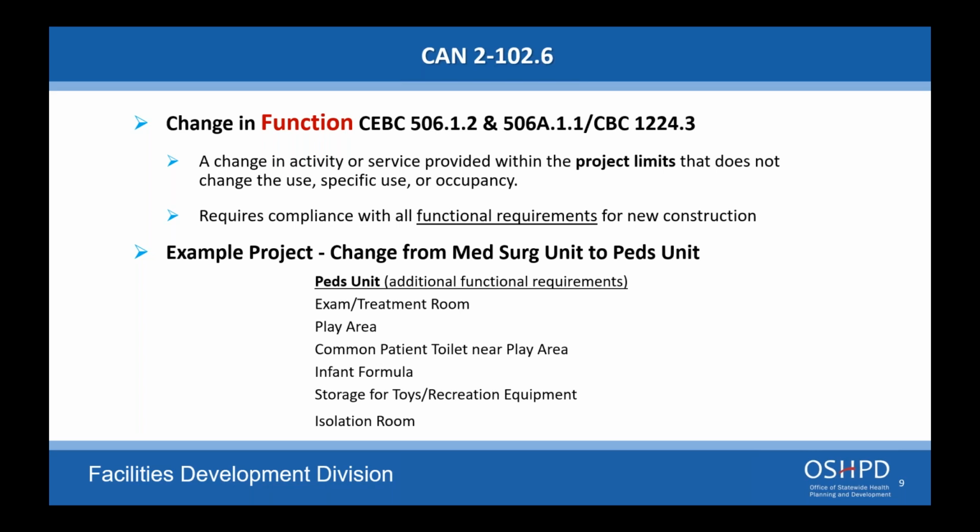But you want to put the list of procedures in the functional program when you submit the project to OSHPD, and we will coordinate with CDPH with the type of project and the list of procedures to see if they have any questions. There are occasions when we do have a meeting afterwards to discuss things that might be kind of borderline, and/or if there's one or two items that alone are prohibiting the use to remain as a diagnostic, so that you can make the decision that, well, we won't do those procedures if it's going to trigger a lot more construction.